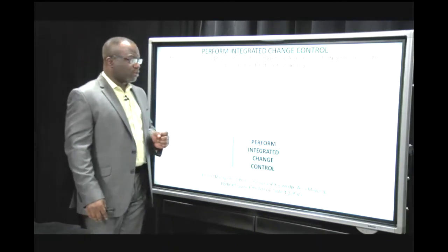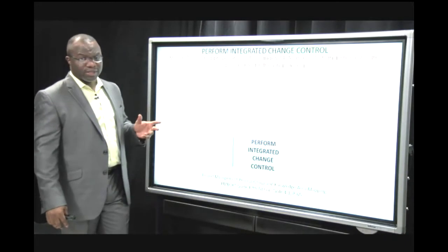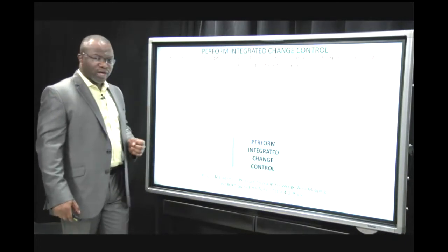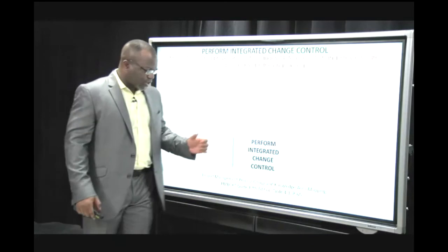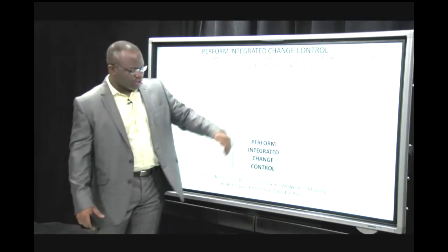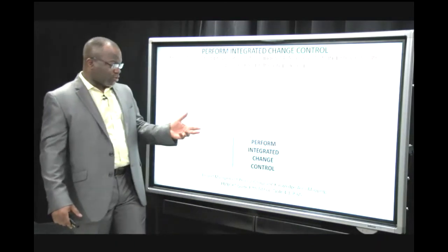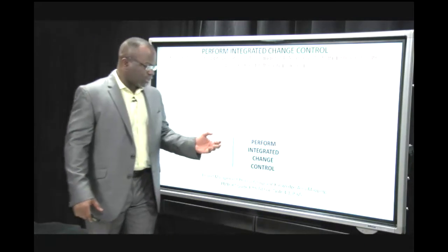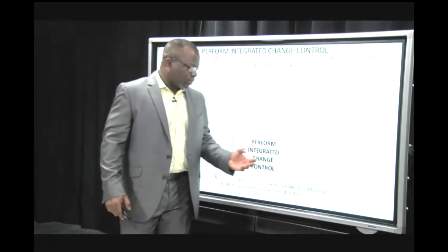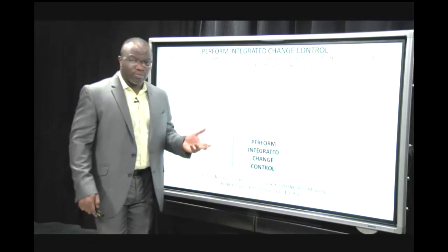The outcomes of change reviews are documented in the change log. And that's really what happens here. We get change requests going in. We apply our change control tools, our processes and approaches for reviewing the changes, and out comes your change log or your approved change request.